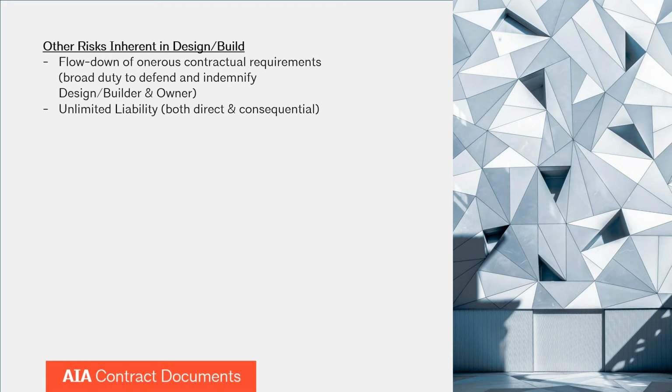Now, oftentimes the insurance requirements will play into that conversation. So, whatever the insurance that is required from the developer or from the design builder is usually a good place to start. We don't like to have limitations of liability that say available insurance, or that don't state a specific amount. So usually we try to have a number stated. But if the developer and design builder are requiring, say, 10 million per claimant in the aggregate, that's usually a good place to start, and it may go up or down a little bit from there, depending on how negotiations play out.